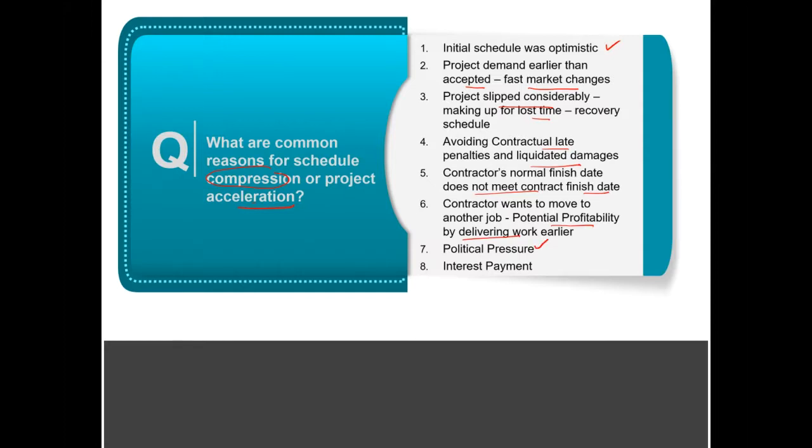Yes, public relations could be one issue. Or you have borrowed heavily from the banks and investors at a very high interest rate, and you want to do the job quickly so that, for instance, if it's a building, you could operationalize the building and generate some cash flow and reduce the interest payment. So there could be a number of different reasons.